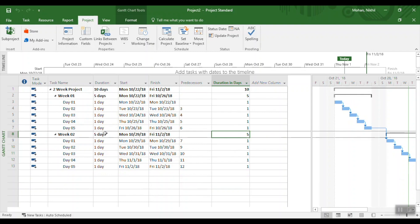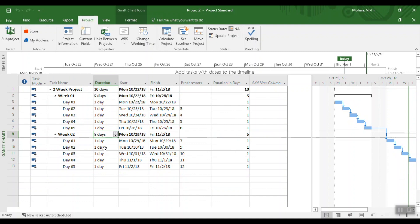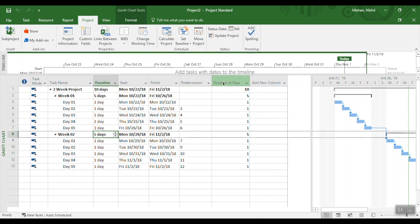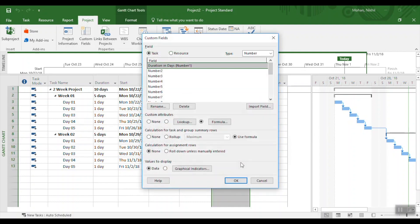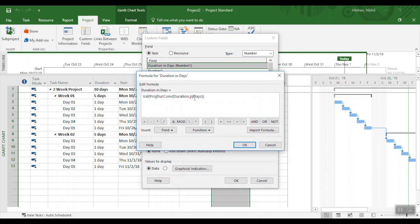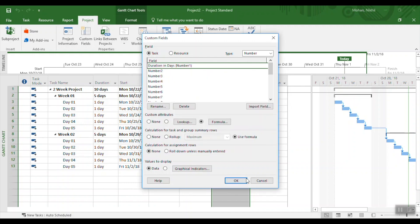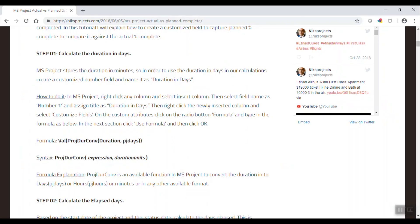Now the summary task also has the formula applied and it matches the Duration column in MS Project. Duration in MS Project is stored in minutes — even though it displays as days, it is actually stored in minutes. That's why we need to paste the formula to convert the duration from its native minutes storage into days. That's all Step 1 does.